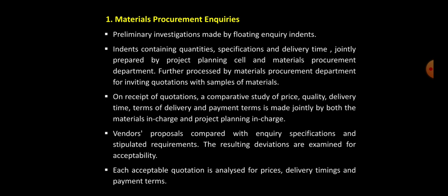The material inquiry indents contain quantities, specifications, and delivery time, and are jointly prepared by the project planning cell and the material procurement department. These indents are processed by the material procurement department for inviting quotations with samples of material wherever applicable or required.